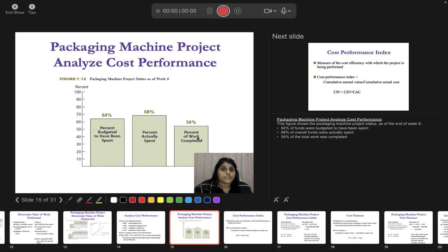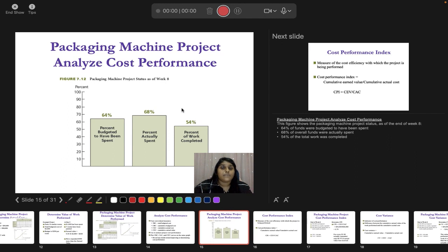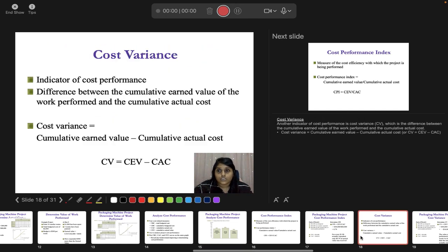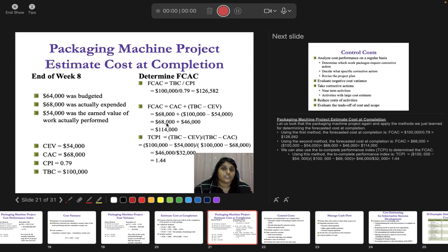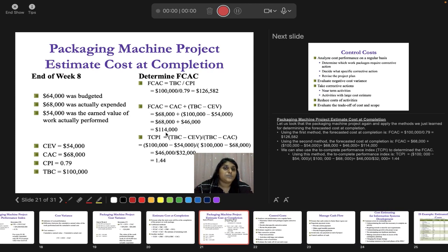Here 54% of the work has been completed, so the remaining for you to complete to the 100% is 46% or $46,000. So you are going to take that $46,000 and you plus it with your actual cost. So that means you assume that your estimated cost at completion is $114,000. Okay, so that means it is different from what you figured out at first. This is approach 1, this is approach 2.